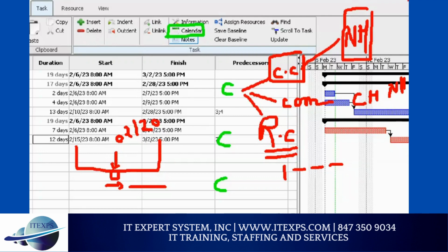So it's very important that you understand the calendar. The calendar allows you 2 things. First, what is your working cycle? So are you starting the day at 8 o'clock, and are you stopping at 5? That means 1 day. So you're mapping your shift with the day. So when you say 1 day, you are actually mapping 8 hours. Makes sense? Because you have 1 shift.